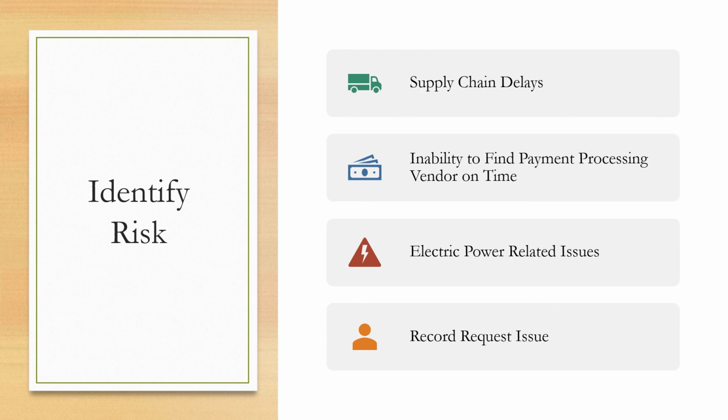The risk that will have a major impact on the project is the supply chain delay because the supply chain will affect us installing our data servers and web servers. Since we'll be using an in-house server, we need to get the hardware so we'll be able to install it, and a delay in supply will cause a delay on the project.